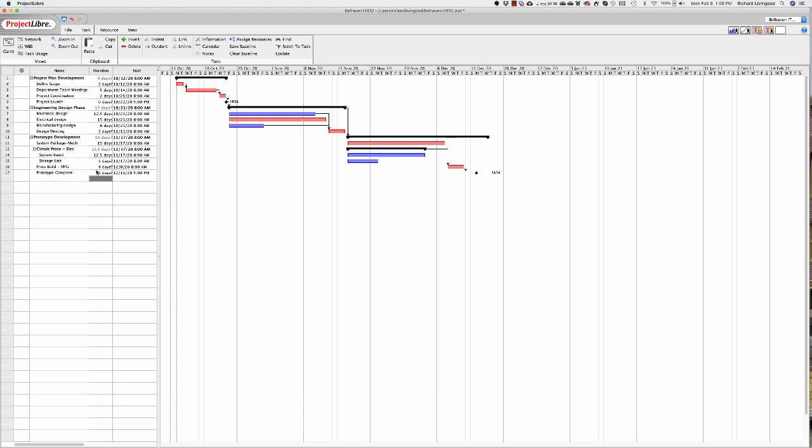One of the reasons you might do that is that you could have an activity that takes place in association with a milestone. As an example, maybe a luncheon, or a post completion meeting that's associated with the milestone, and maybe that meeting is 3 hours long, and if it was, then it will consume some time.